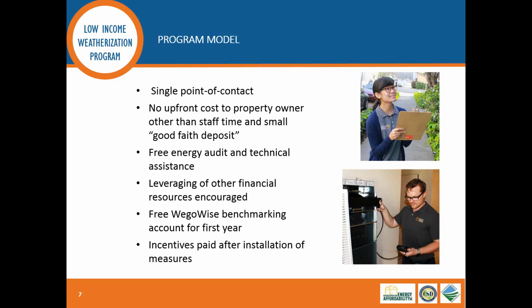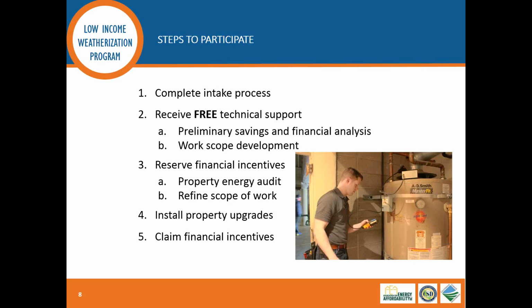The incentives themselves through this program are paid after the installation of the measures. So the property owner needs to have access to upfront capital to pay for the installation work until the program incentives are paid. And it's up to you as the contractor and the owner to figure out the best payment process to compensate you for your work and time.